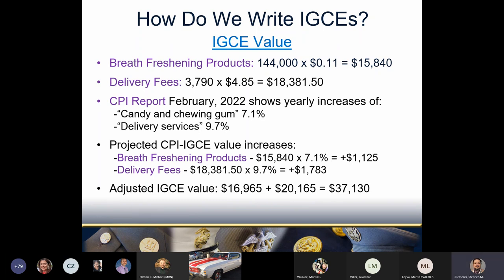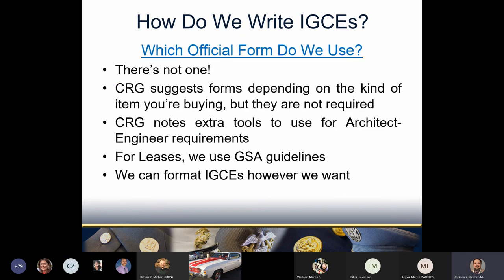Now which official form do we use to record the IGCE? There isn't one. The CRG adds pointers if you're doing architect-engineer contracts and has some suggested forms, but there's no mandatory form or format VA-wide. We could use whatever documentation we choose or that your particular NCO requires. However we do it, we need to cover the key details in a way others can understand. I like using Excel spreadsheets because their math capabilities make number crunching easier, and they allow me to integrate GPC reports and FPDS reports as individual tabs in one file — showing all my math and all my references in one spot. The slides we made in this class could serve as a perfectly proper IGCE.